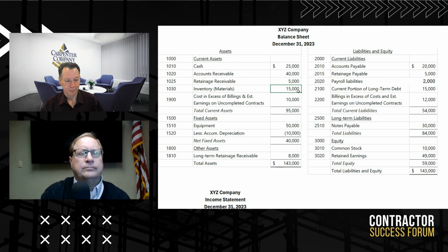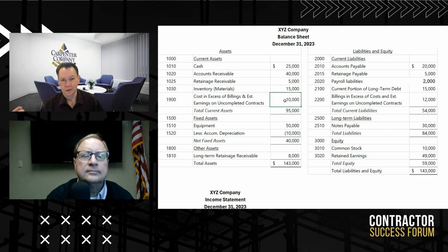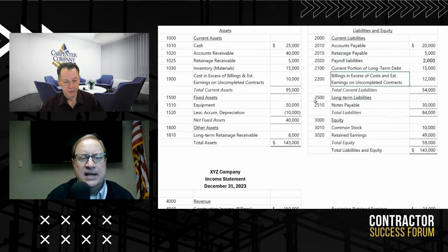Typically, when we set it up, I will do like the 5100 for the labor, 5200s are the materials, 5300 subcontract, 5400 equipment, and the ones under like the 5400 to 5499 would be equipment related, like depreciation or repairs and maintenance on your equipment or some kind of equipment burden or leasing. And then other job costs, I would probably break down some subcategories of this, but things like your bonds, other things, shop supplies or whatever that would go to the mobilization and job utilization cost.